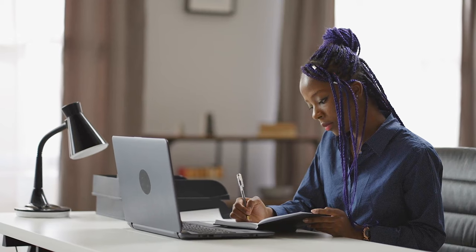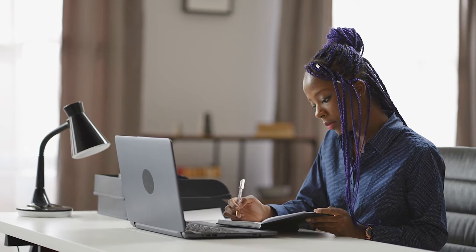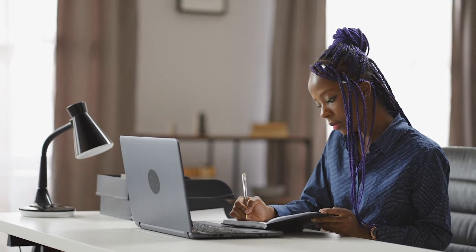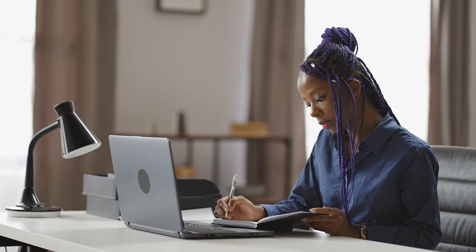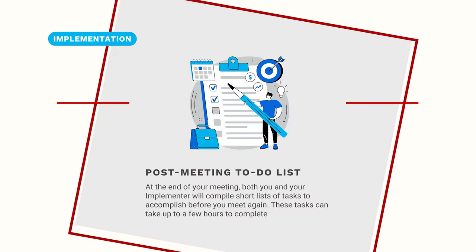At the end of each working session, you will have a to-do list and your implementer will also have a to-do list. Many clients ask how much time they should budget to complete the client to-do list each week. This depends on the project specifics, but on average, clients spend between one to three hours each week working on project tasks.